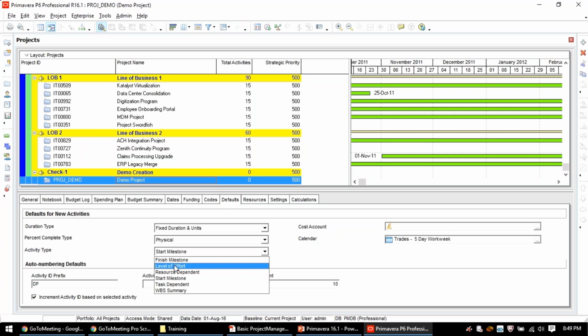It is an ongoing, repetitive activity. All levels of effort are called ongoing, repetitive activities. In general, lunch during office hours too, whether you do something or not, you will go at 12 or 1 o'clock. That's the level of effort. It's just a view so that on a project I'll be on safe mode, saying yes, daily meetings are also included. If you don't include this activity, people will think, where are my daily meetings? I need to see all the activities happening on a project. That's the reason we put the level of effort, but normally not more than 2 to 3 activities.